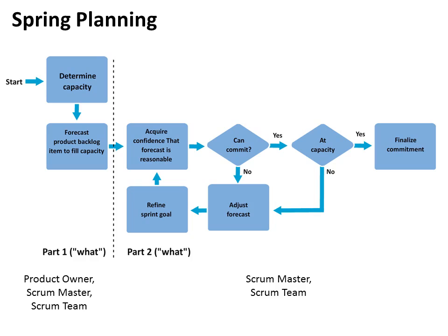Sprint planning is broken down into sprint planning 1 and sprint planning 2. Part 1 is attended by the product owner, in which the focus is on what are the items that would be done in the upcoming sprint. And generally, depending on the velocity of the team, a certain number of product backlog stories are pulled in and discussed to understand what was in the mind of the product owner when he wrote them down.